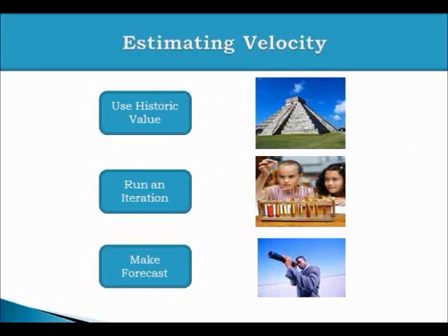Now you also need a velocity for doing release planning. How to define velocity, and this is a typical question which I get in all my trainings and all my sessions. How to estimate a velocity? If you have good historical data, you can follow historical values. If you don't, then you can experiment. You can experiment for a while. If that is also not an option, then you need to forecast it.